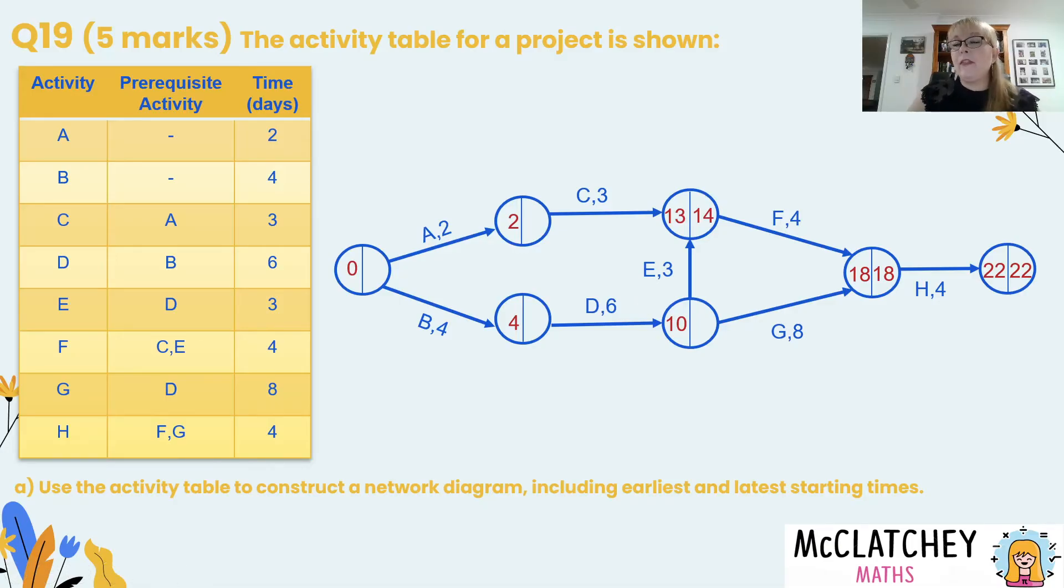So now I'm going to move back that pathway along C. 13 take away 3 gives me 10. So now I've filled across the whole top of that first pathway. So now I'm going to come back and backward scan through here and here I've got some choices. Coming down this pathway here I'm either going to have 14 take away 3 which is 11 or 18 take away 8 which is 10. So I've got a choice of 11 or 10 to put into this vertex here.